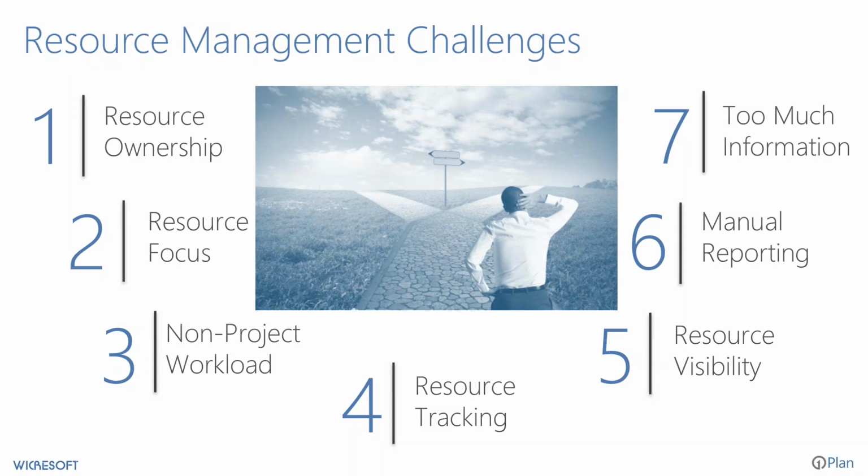Non-project workload. Sometimes assumptions are made based upon resources being too broadly available for project-specific work. And if we have the wrong assumptions there or plan or make commitments based on faulty assumptions, the ability for us to deliver and succeed and deliver when we say we're going to deliver with a quality product gets impacted.